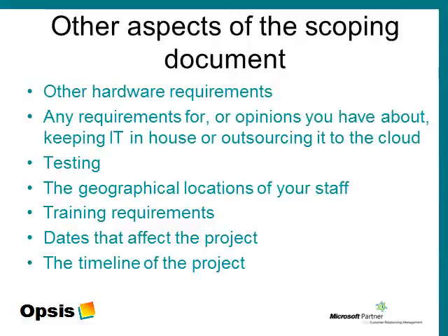Training should be conducted so that each user gets the training that they deserve and as close to their go live as possible, and certainly not more than a fortnight before go live. This is key to maintaining their morale. Gaining the support of your users so that they will use the new technology is imperative if the solution is to be successful. Training is one of the ways to ensure that this does happen. Training is also required for the testers, especially for user acceptance testing, and this has to be done prior to the testing.